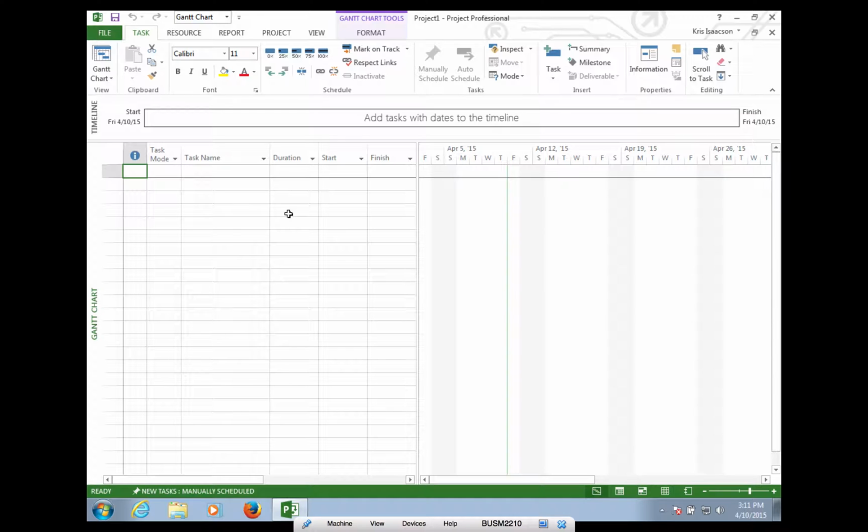It lists the resources that we're going to need, both people and some travel expenses, and then it lists all of the work in phases that we will need to set up, and each item, each task on there gives how many days, who is going to be working on it, and if any additional resources will be needed at that time.